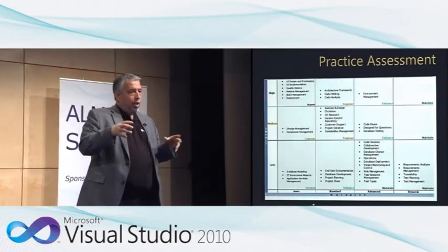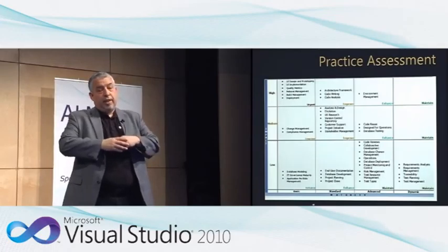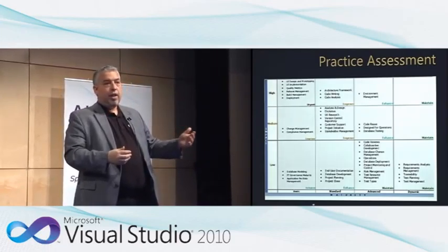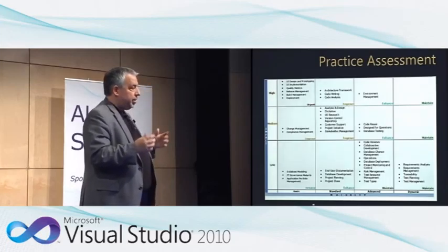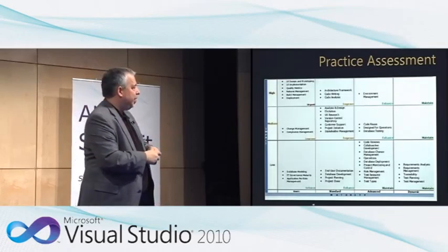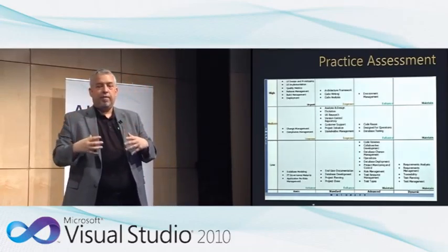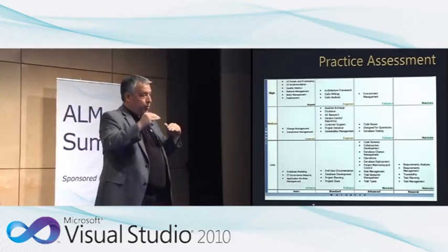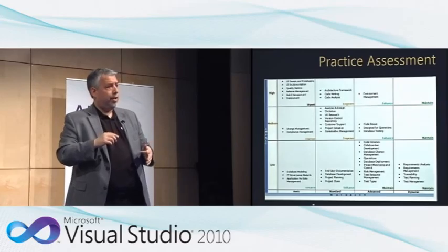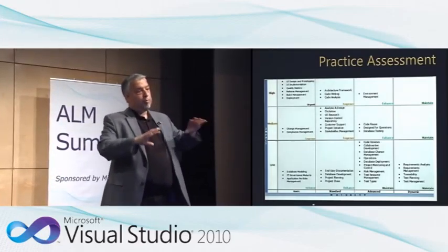And then on the other side, not everything is important for every team. So for one team, performance testing might be extremely important because they have a public site with a lot of load. For another team, they do a system for a few internal users in finance. The impact is not the same. So the other axis is really to look at what's the impact of going to the current good or best practice, or as the earlier speaker was mentioning, really good practice for now. So basically getting to what we can get to with what we have in terms of tools and process. And will that be a significant impact for us? Really change the way we work, give us an order of magnitude improvement in productivity, quality, or predictability, or is it just a slight improvement or pretty much status quo?